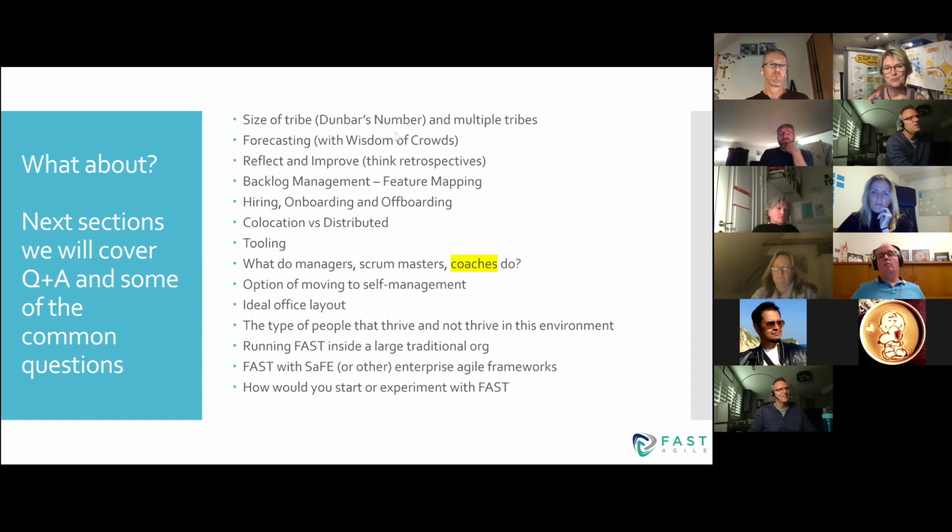And what's the first thing you do as an Agile developer? What's the first thing you do when I give you a large story, a feature, an epic? Break it down. We're going to break it down. So that's exactly what we're going to do. So, hey, before we can do anything, let's call in the product director. Product director, which SMEs do I need to talk to understand more about this? And he goes, great, you asked. I'm going to bring over these 3 people here. They're the SMEs.